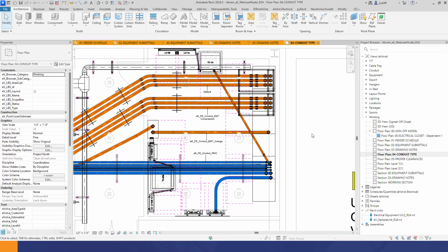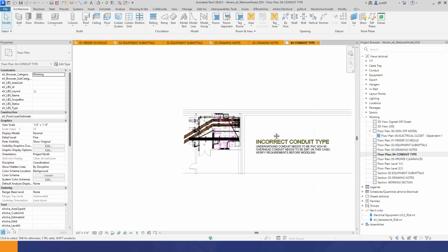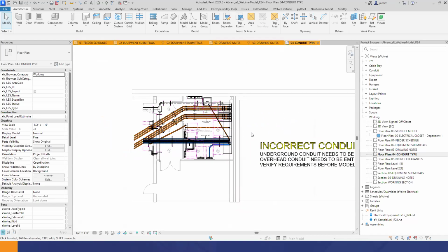So that would depend on the scope, the level of development needed for the project, and the specific trade as well. Schedule is also very important too, because if there's the proper amount of time built into it, then we could get away with maybe a team of three or four on, let's say, a 200,000 square foot project.